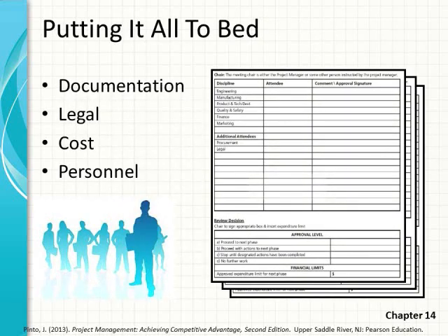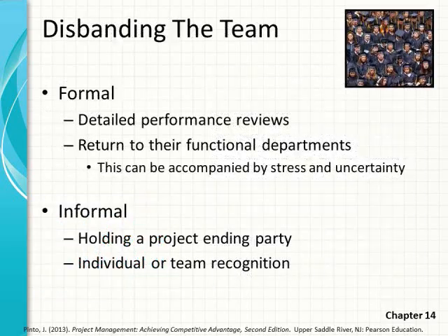Now, putting a project to bed, that means filing all your documentation away for later retrieval, dealing with any legal closure, finalizing costs, and then disbanding the team or the personnel, like I said, either back to the functional organization or onto other projects. Now, disbanding the team takes 2 forms.